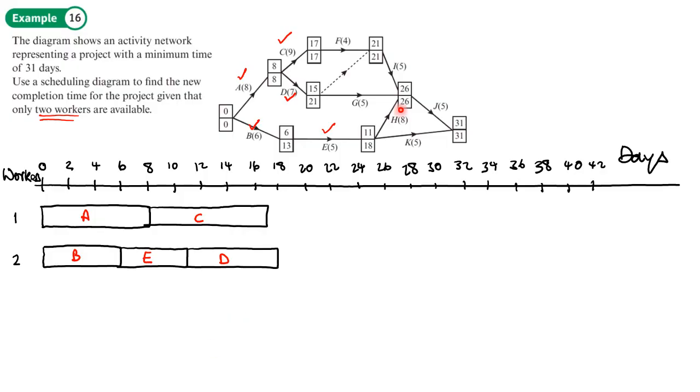We have a choice of different activities, but remember we want to pick the ones without a float because we don't have a choice. So activity F is what we're going to put in now and that has a length of 4. For the next part, we've got choices for different activities that we could start with. But the one that's going to get it finished in the quickest time is assigning activity G here. By using activity G which has a duration of 5, we can put that in here.